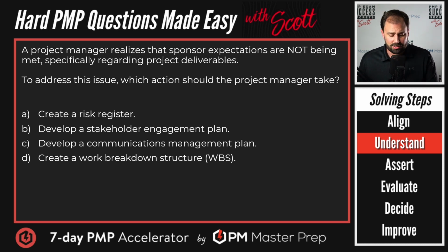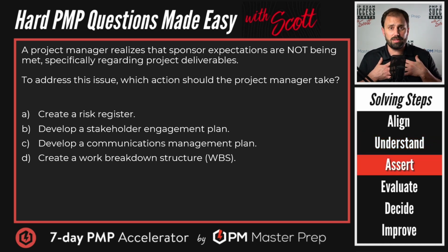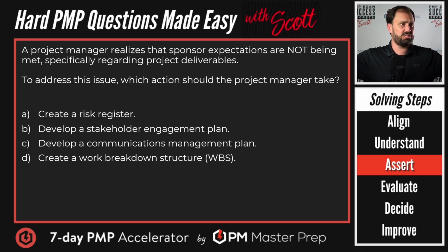All right, so let's go to step three and assert what we think the real problem is. The real problem, in my mind, is that we've developed this project, we put a baseline down, and it doesn't directly match with what the sponsor wanted, and it doesn't sound like we've gotten their adherence in a way that they realize what they've actually gotten themselves into. We need to clear it up and make sure there's clear alignment so we don't get bit later, with them saying, this is not what I wanted. I know I signed something, but you're my steward. Why didn't you tell me? We don't want that.